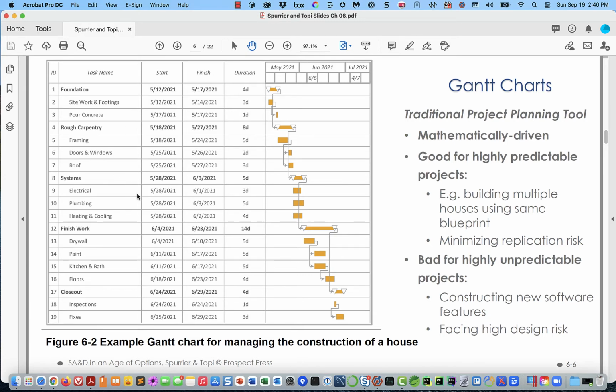Okay, and you can even have things get summarized at more levels than that. And so we pick a duration for each of the activities, and then we put information into the planning tool that eventually allows all these lines, these are dependency lines, to be drawn.